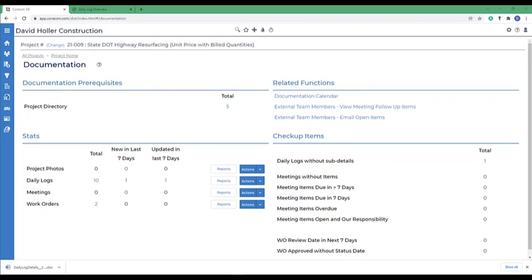It's important for builders and contractors to manage risk. One of the tools they can require of their superintendents or project managers is to implement daily logs. This is especially important if a dispute arises. Documenting on a daily basis activities, progress milestones, manpower, major deliveries, equipment, and weather and site conditions can be valuable